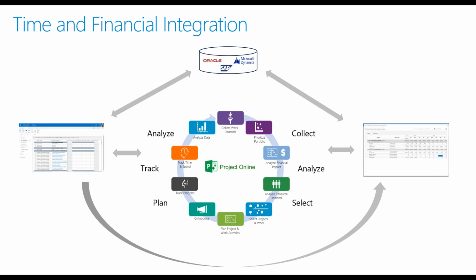Over on the left-hand side, during the tracking piece, you may need to collect time, meaning that the timesheets process and collecting actuals to figure out what we're really spending from a labor perspective as opposed to what we thought we were going to do up front needs to be dealt with in some shape or fashion in that regard. And then